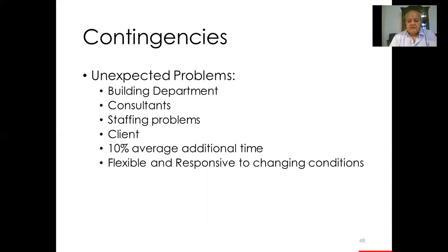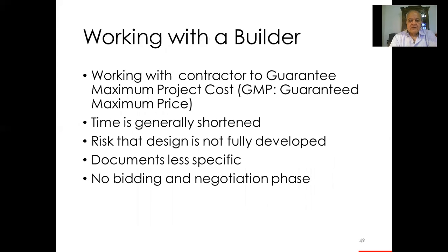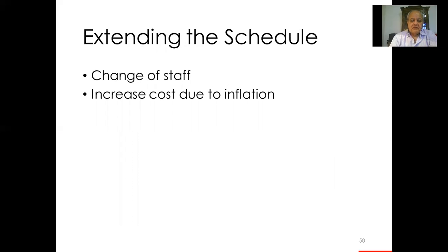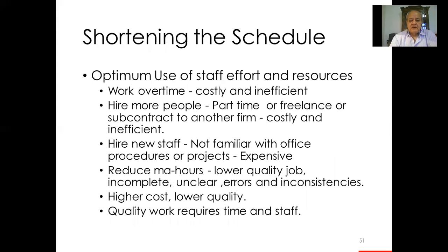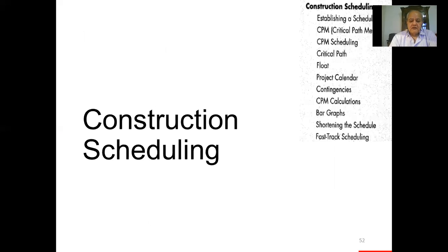Make sure that you have some time for contingencies, about 10% of the time, if there are problems, or conditions beyond your control that need more time, and so forth. Also, look at the impact of the schedule on the contractor and the suppliers of material.